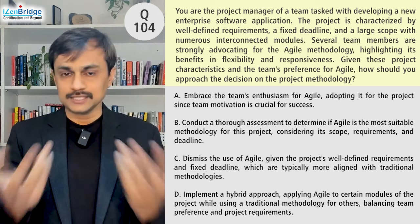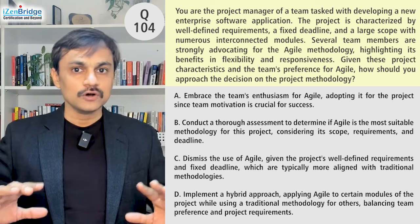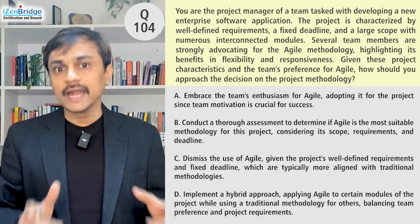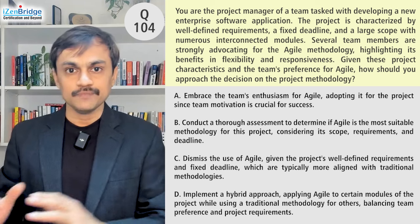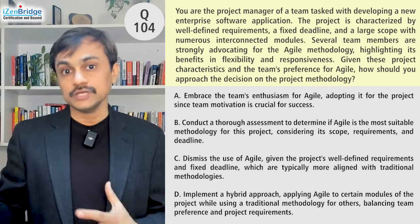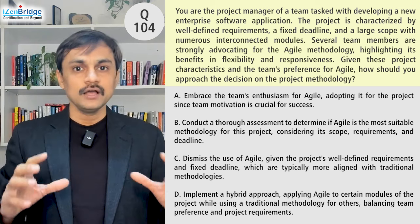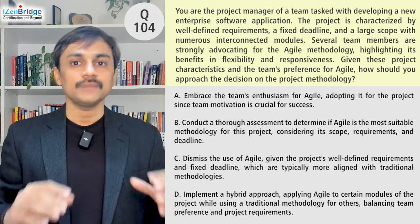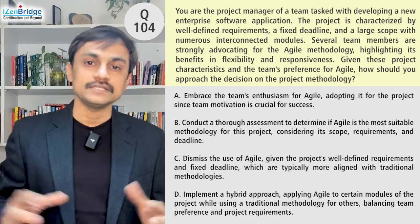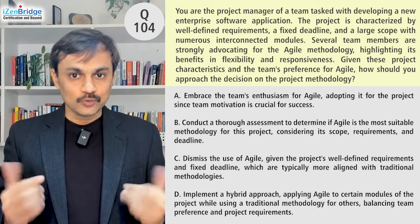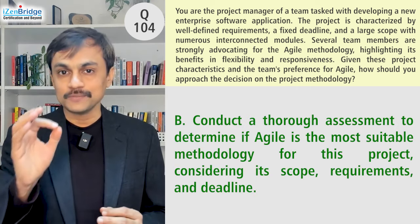Why do I still recommend B? In PMI-style thinking, when you get a suggestion, you need to make sure you look at it, provide sufficient data and conversation, and then move to the decision. Option D is directly stating the decision. It could be the decision after analysis, and I personally believe that might happen — but Option B says: talk to your team, figure out various parameters, put proper analysis in place, address the Agile recommendation, and then decide which lifecycle is suitable. It's a close choice, but go with Option B.